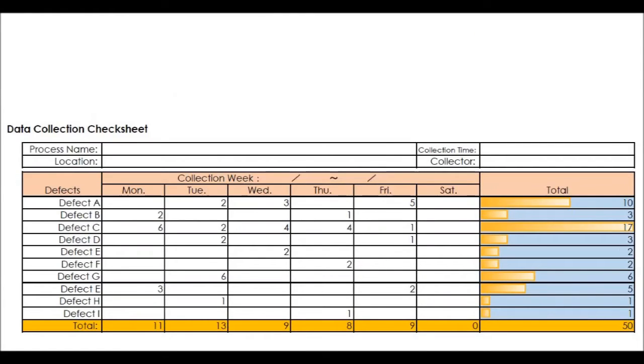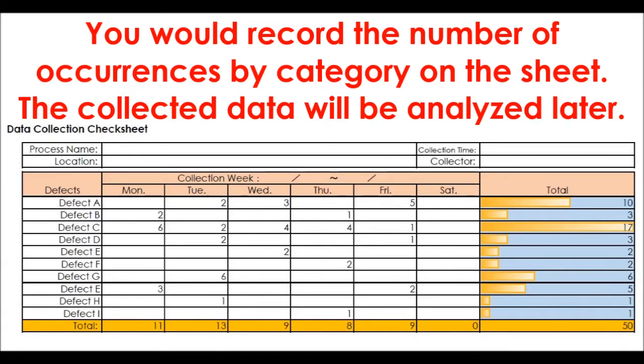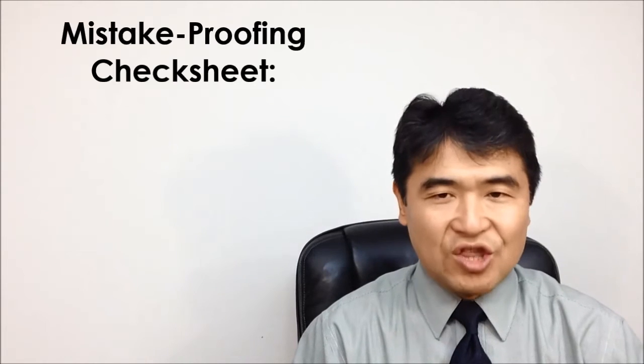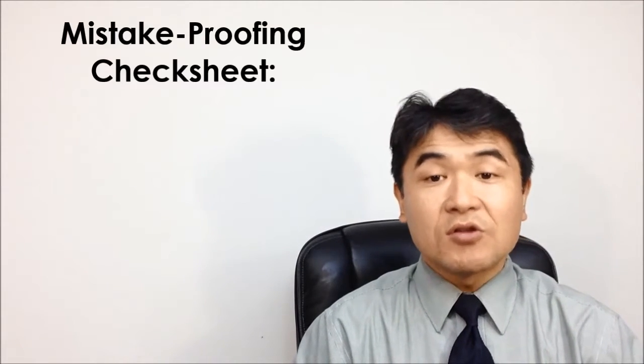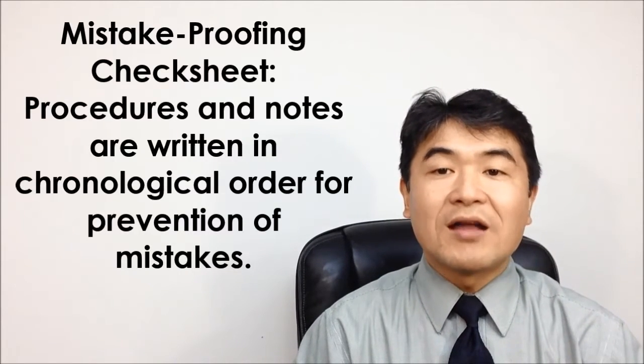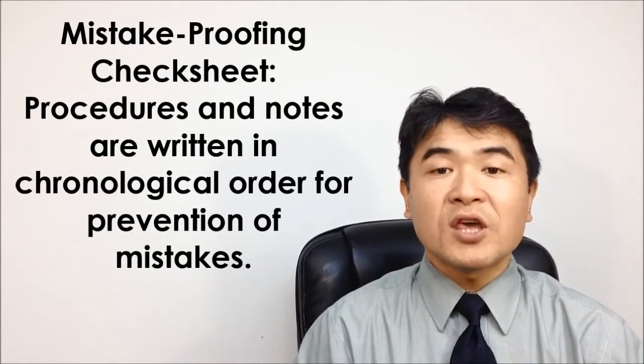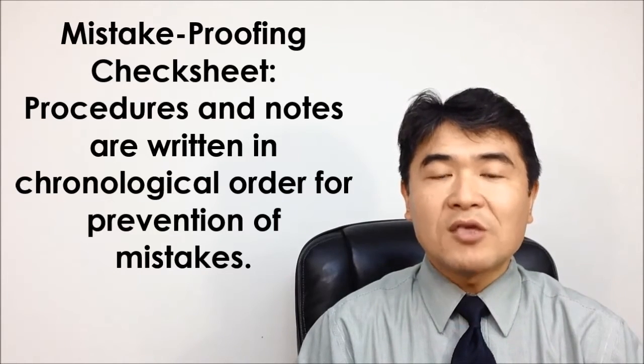This is a check sheet. This example is for data collection. You would record the number of occurrences by category on that sheet. The collected data will be analyzed later. There is another kind of check sheet. For mistake proofing, also known as a checklist or to-do list, procedures and notes are written in chronological order for prevention of mistakes.